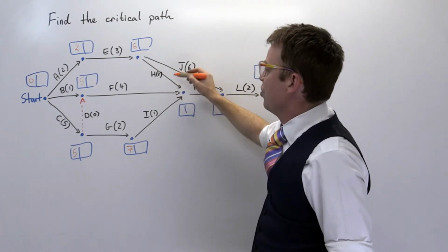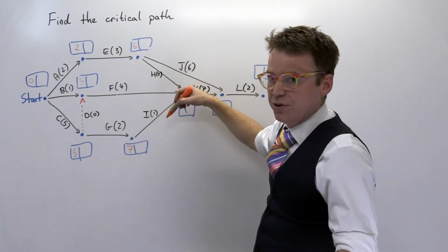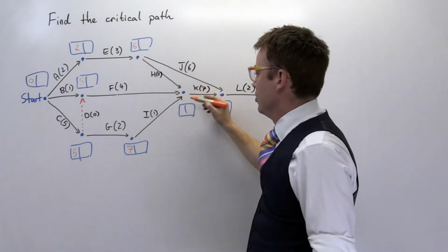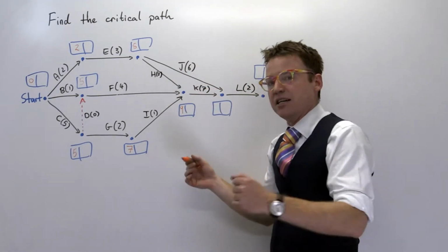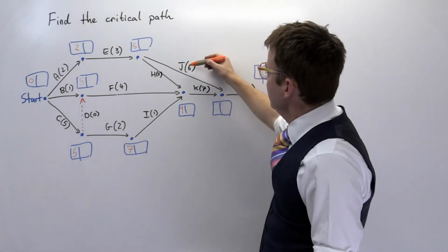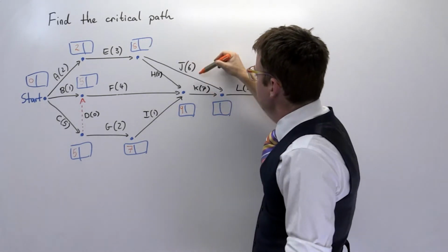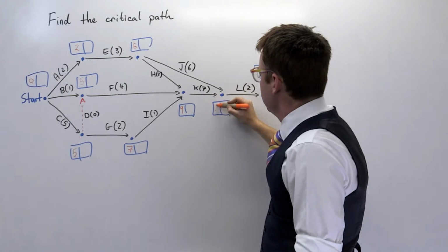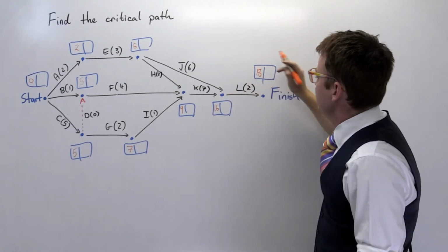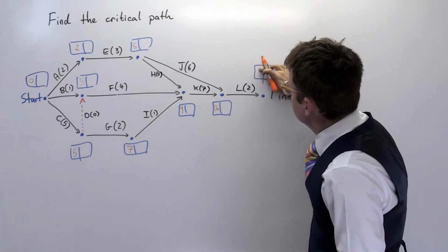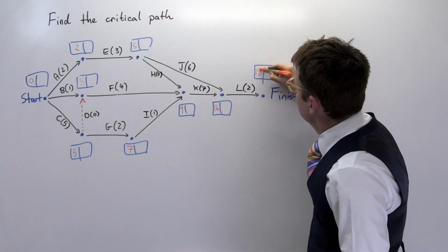And you have to wait for all 3 before you can proceed. And so all 3, the earliest all 3 can be there is at time 9, i.e. the maximum. This one here, that's going to be 11 or 16, we take the maximum. And this one, well, there's just one thing there, 18. Great, we've done our, I'll just clean that up a bit. We've done our forward scan.